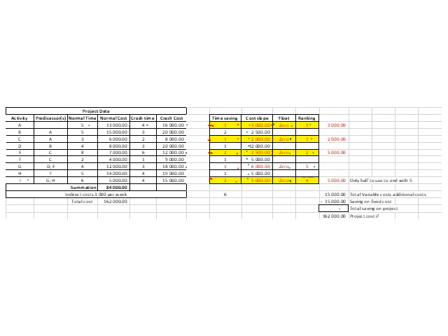So what we want to do is reduce our project by 5 weeks. What I just did here is show you that if you add all of these items highlighted in yellow, you will get to 6 weeks, and thus we don't have to use the full amount for one of our items. So basically, starting from our first one, we reduce.